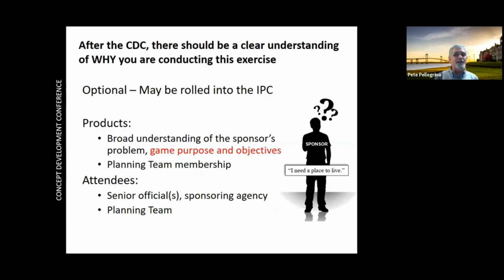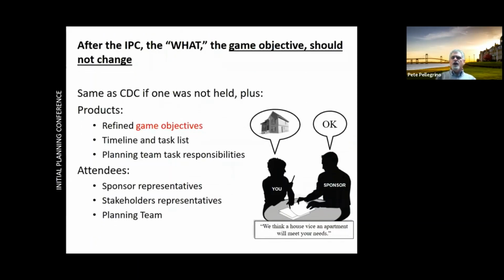And you may have a very hard time getting to them, and we'll talk about why here in a bit. So from that, we can move on from the definition of what your need is, what's the problem, to start throwing out some broad pieces in terms of the objective, and start to narrow that field. Remember, you've done a little work, you figured out your problem space, you made it smaller. In this case, we can start putting some of the more concrete stuff down in terms of timelines and who's going to do what, who's got responsibilities for what, downstream conferences, and start working your plan, your POAM, your plan of actions and milestones that you lay out.